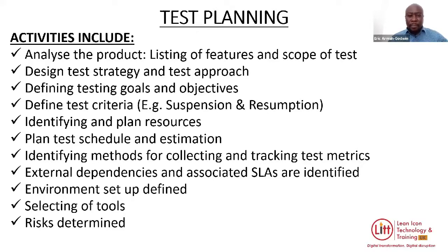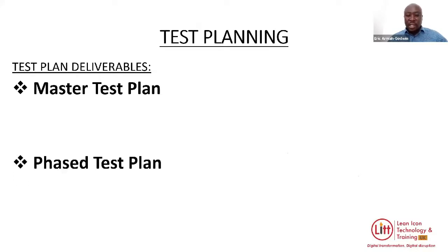This test planning results in production of some deliverables. Okay, I'll give you two of them. The master test plan, which is a document that you deliver, and then the phased test plan.